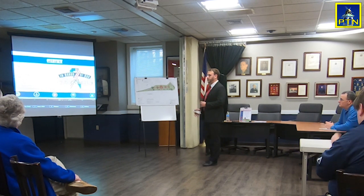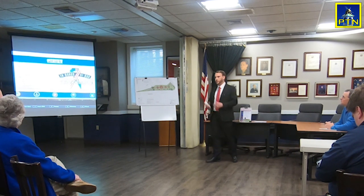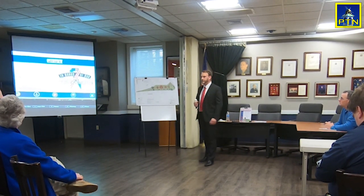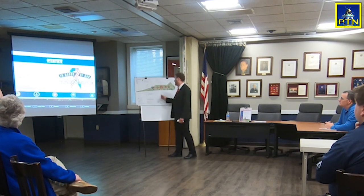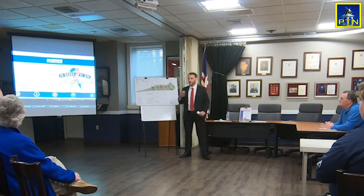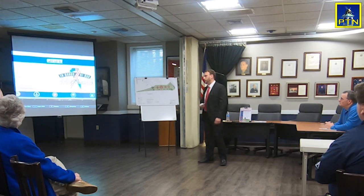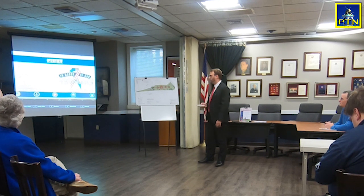Basically what we've done is we've taken all the feedback from the first meeting and we've created a phase one. There were some controversial topics from the last meeting. Some of those topics were the parking, as you guys know, and we've taken those out of the phase one project. We're only going with the walkways in phase one, irrigation, and a well, just to revitalize the property.